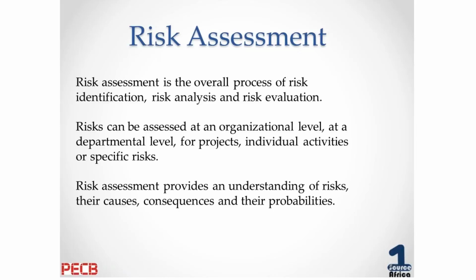Now why causes are important to risk analysis and risk assessments is because the causes are in all probability the things we can manage and not necessarily the risk as such as we identify. Now typically on causes we would identify controls or processes or put some mitigation in place to manage those. If we can manage the cause of a risk, in all probability or inherently we will be managing the risk.